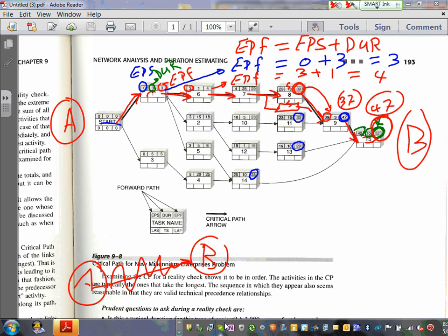So this is your plan, and Microsoft Project, guys, calls this schedule a Gantt chart, and this is what you plan for. Then the actual, you start filling the actual in it. You can see then, well, this task took 3 weeks. I assigned 3 weeks for it, Adam. I was able to do it in 2 weeks. Go getters, great. Now we're ahead. This I assigned a week for it. It took a week and a half. Oops. Keep an eye on it. You know what I mean? And then you keep an eye on the duration of this part of the project, guys. Ultimately, this project is going to take 52 weeks.